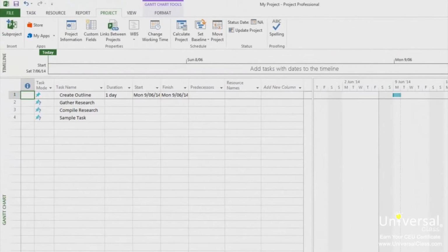If you want, you can make it so the task calendar uses a different base calendar than the one you choose for your project. When you do this, the task calendar that you use will overrule the base calendar for that particular task. For example, if you choose the standard calendar for your project, but a 24-hour task calendar, a task duration of 1 day would be 24 hours instead of 1 day.